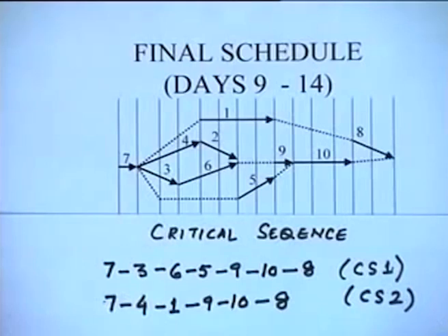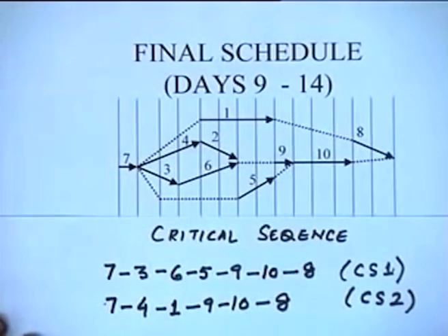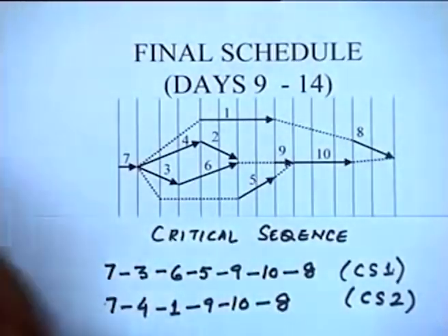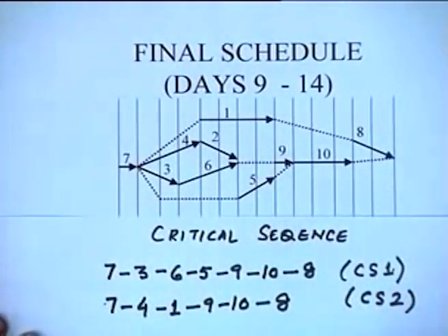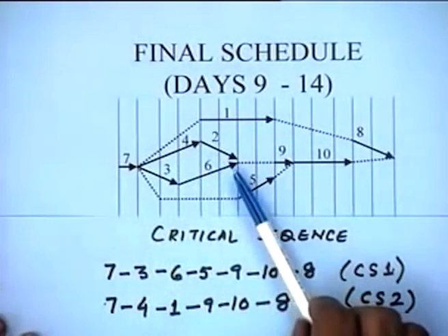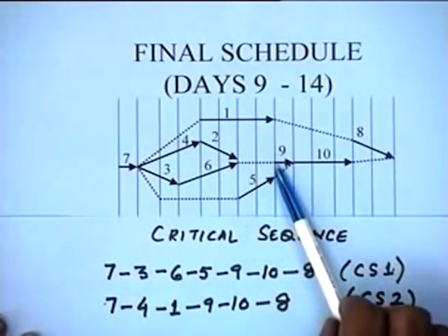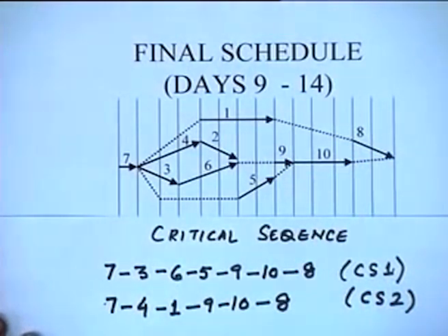The term that is used for such things is the critical sequence. So there are critical sequences, and there could be many critical sequences in a particular problem, but you will not have necessarily one connected path like we had in the earlier case. Right? Here there is a break, so you go here, then change again here. So this is another interesting feature really. The notion of the critical sequence is actually used in modeling the problem sometimes. Basically when you are trying to model the problem, instead of dealing with the critical path, we have to deal with the critical sequences for such problems.